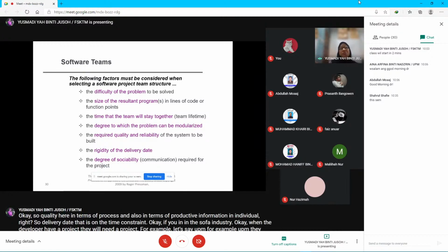So usually they announce that to software developer companies by tender. The tendering system is that they come out with one document stating the expectations, how much they are willing to pay, everything about the system they expect. Then the company bids on that tender. If interested, they send their proposal document.